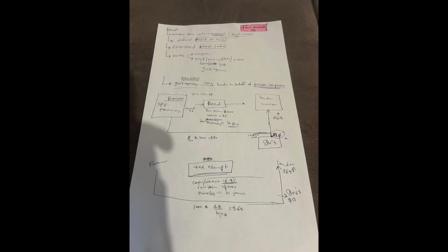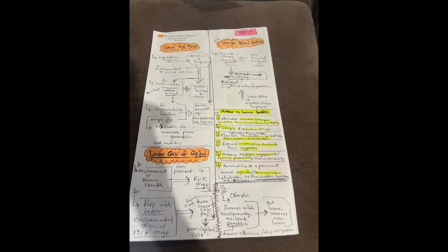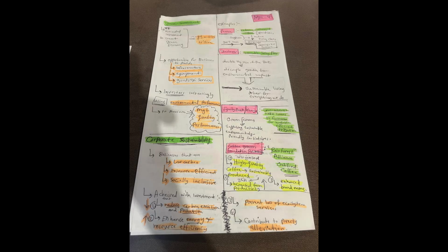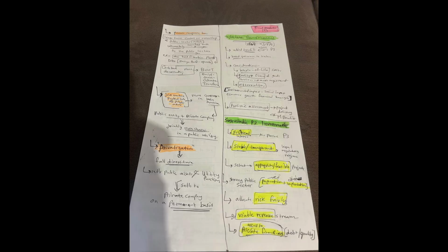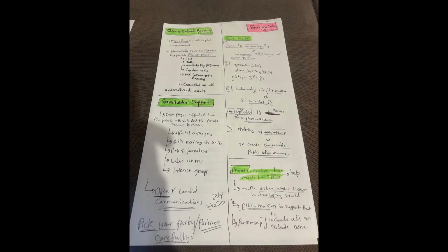Exactly. The SPV is a separate legal entity created just for the project. And the main point of all the legal paperwork is really to protect the lender's money. That's job one. And these projects often involve a lot of debt, right? Typically, yes. A very high debt-to-equity ratio is common. And critically, those loans are usually secured primarily by the project's expected future cash flows, its physical assets, and the SPV's legal rights under its contracts.